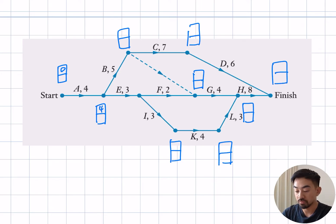Going up to B is 4 plus 5 is 9. I forgot a little box there. 4 plus 3 is 7. Okay, coming across here, 9 plus 7 is 16. Now you notice here, what do you actually do here? A dummy variable represents 0. So it's either 9 plus 0 or 7 plus 2. Well, they happen to be the same thing, so that's going to be a 9 there.